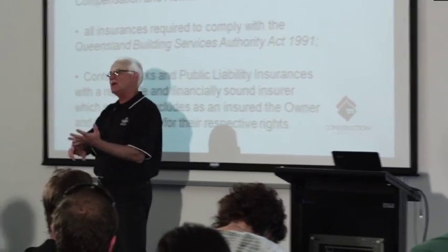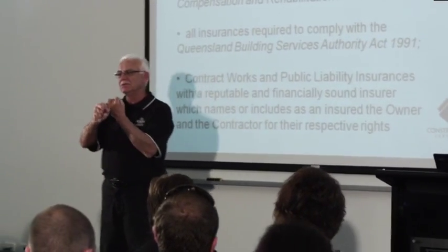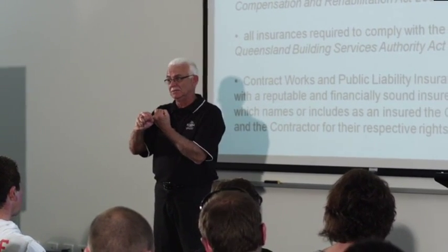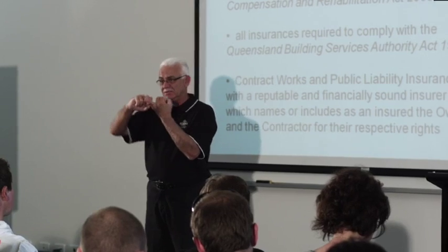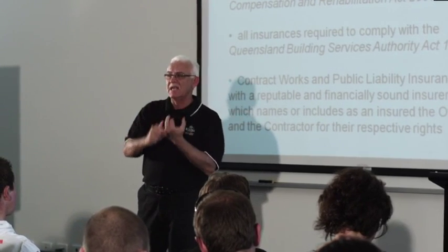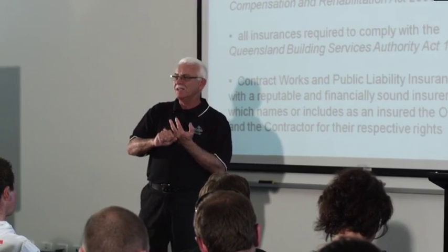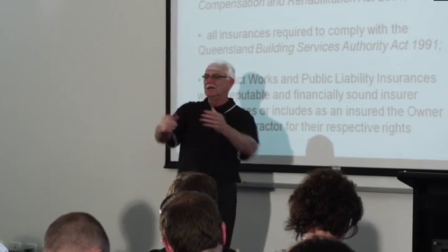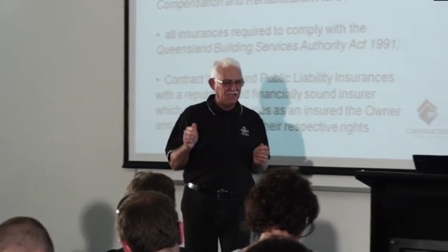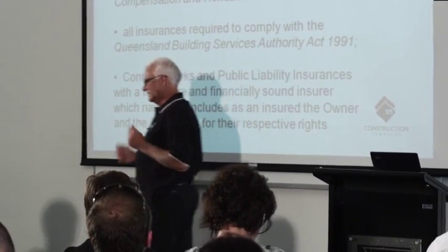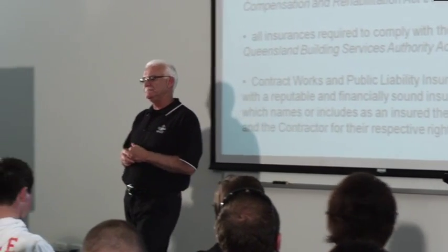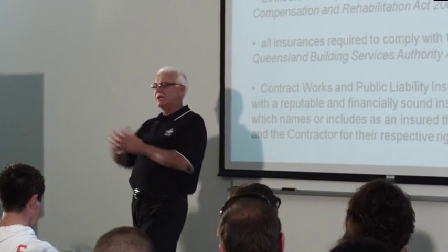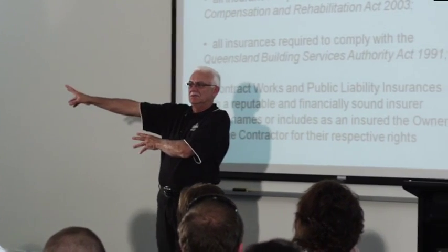However, when you're a builder and you build for an owner, you must pay BSA insurance. That's the most important one. All right? The BSA insurance. It's there for the owner's protection, and it's not something that you pay. You put it in your contract as a price, right? There are some builders out there at the moment that, dare I say it, don't put this in to win a contract. It might be cheaper than what you are. God help them if they get caught.